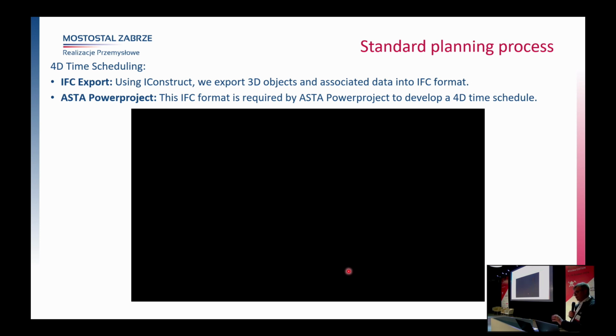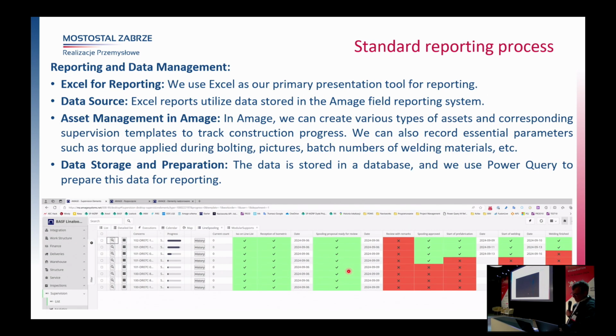This is not easy to check in a huge, I don't know, 3,000 lines time schedule, to see if everything has a really good connection to create a correct erection sequence. But if you see this building in the 3D model, you can easily spot some discrepancies or gaps.